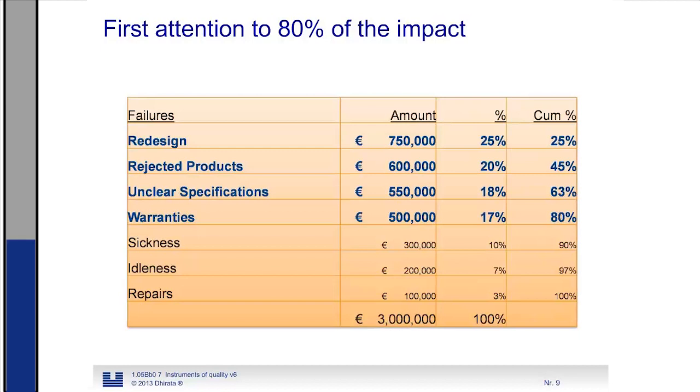Suppose you have delivered an ICT system and are in the testing phase. There is limited time available for conducting all the tests. Using the Pareto Analysis would give you the opportunity to focus on these errors with the most impact, on those subsystems with errors that have the highest priority. The Pareto Analysis helps you to calculate this priority.